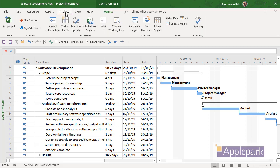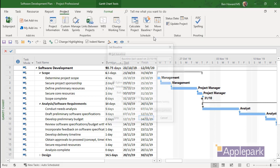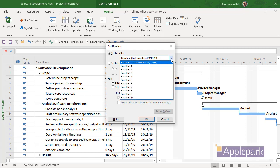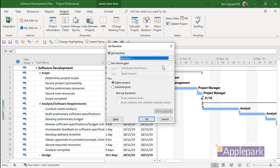I'm going to go back into Project and then I'm going to take the second baseline. So Set Baseline. You can see I've saved a baseline just now, last saved on the 23rd of the 10th, and I'm going to now save into Baseline 1, again for the entire project. We'll click OK.